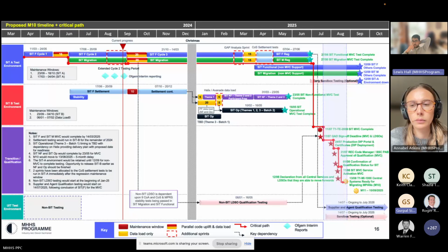Yeah, so it's actually not making the exact same set of mistakes in terms of assumptions. It probably follows more of an S curve approach. But yes, we will share the assumptions that underpin the plan. There's a slide after this that has the model and the proposed points per sprint that are needed. We factored in what the current rates are and what the level of improvement sprint on sprint is across the cohorts, and tried to come up with what we think is a reasonable and logical increase. So ideally, when you see the points per sprint, they're not stratospheric in terms of numbers, unattainable.